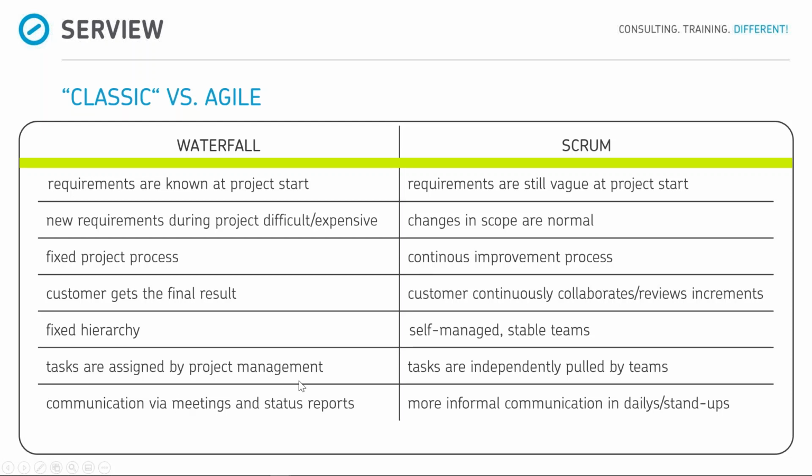So this means that when we are doing Waterfall and the plan is fixed and the requirements are set, new requirements during the ongoing project are going to be difficult to incorporate, because there is no time, no money for going back. This has not been planned. And this also means, obviously, it's going to cost you more. It's going to be expensive: more time, more money, more resources.